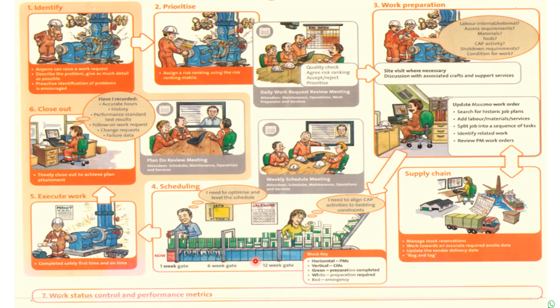For example, before the task execution, at 12 weeks, he will start to have some accuracy for the schedule or for the job. After that, as we near the release of the weekly schedule, we will have all the requirements from material, spare parts, tools, and everything. Then finally the scheduler will release the weekly schedule containing this job.